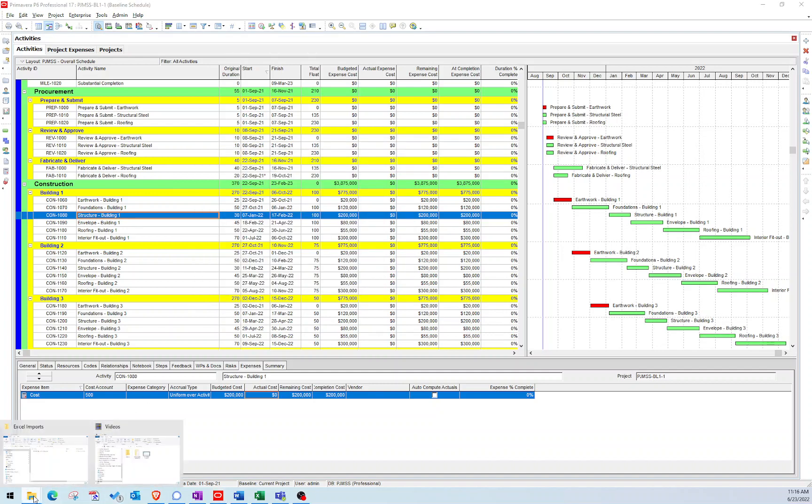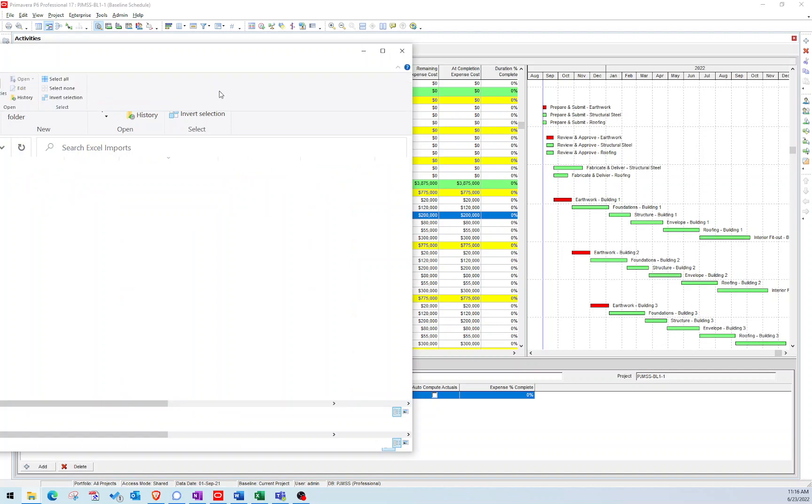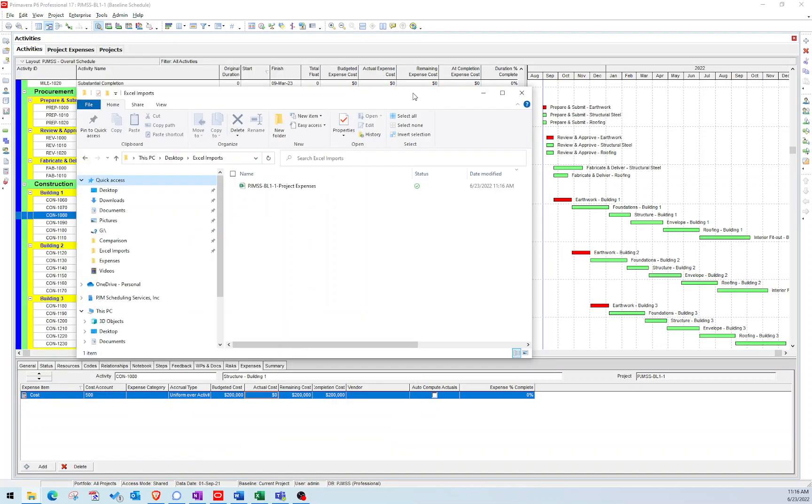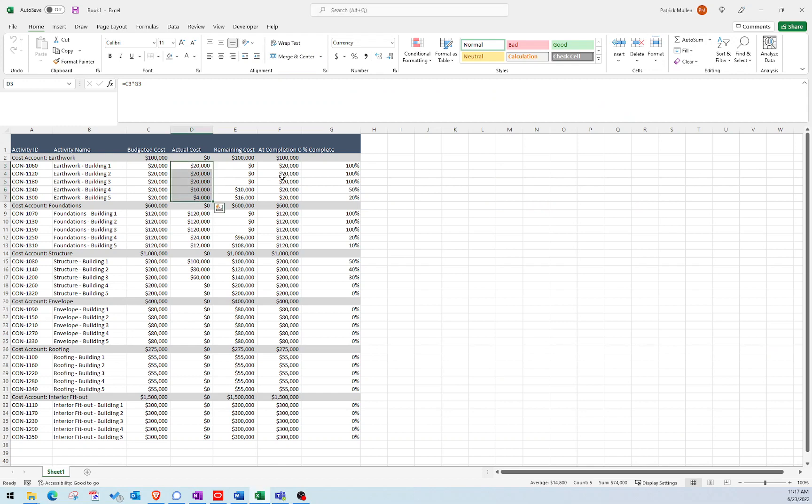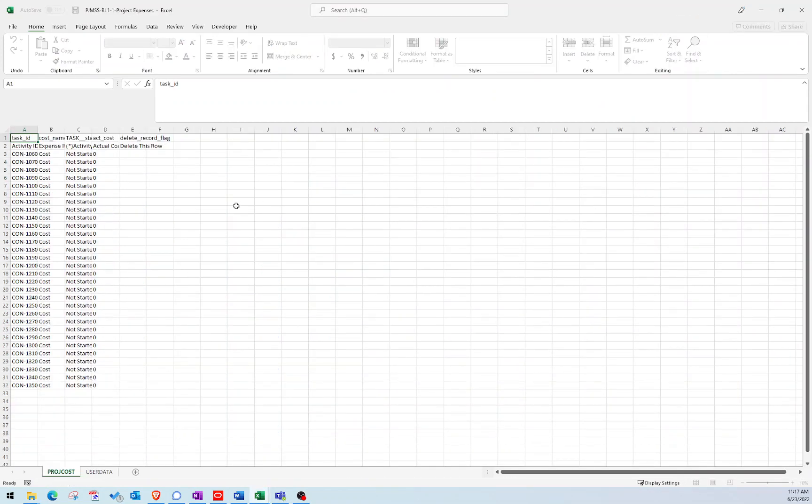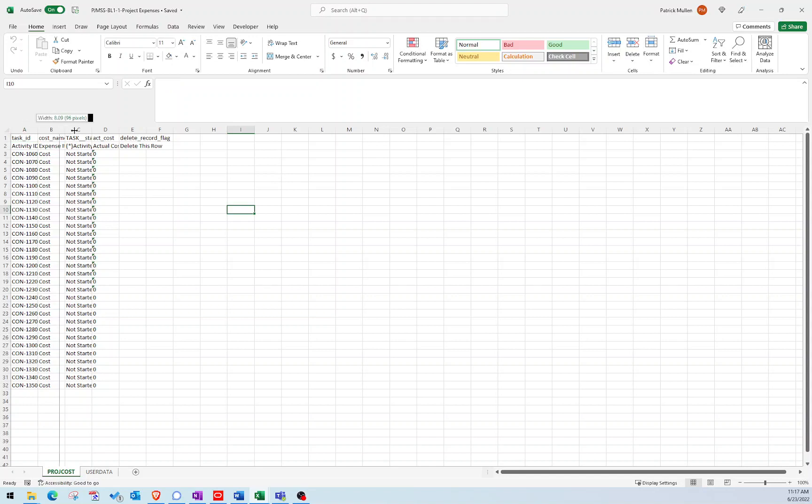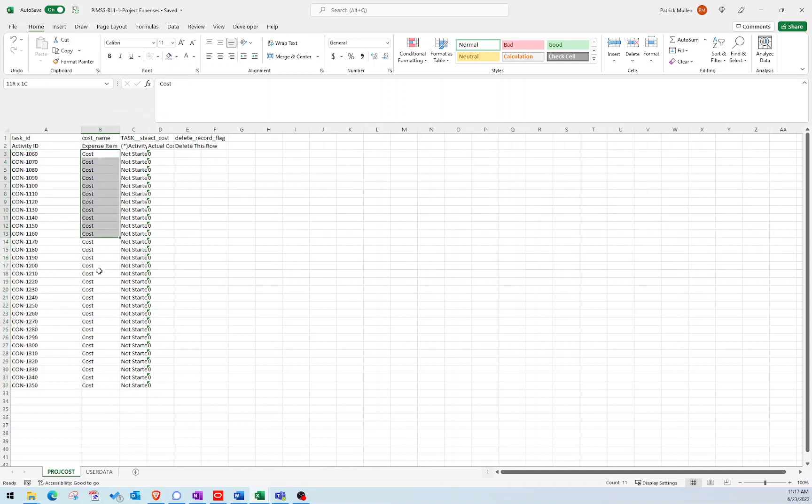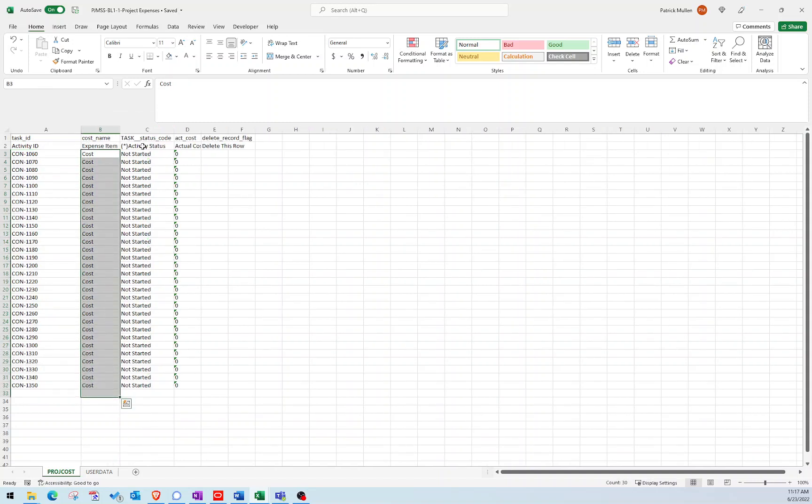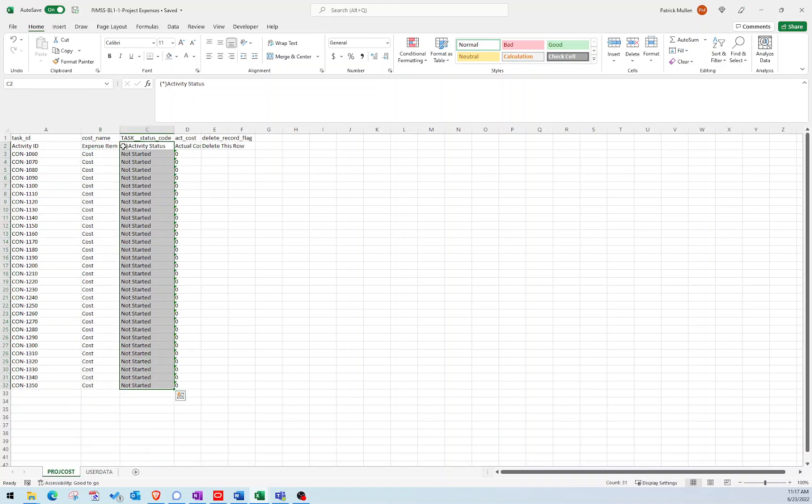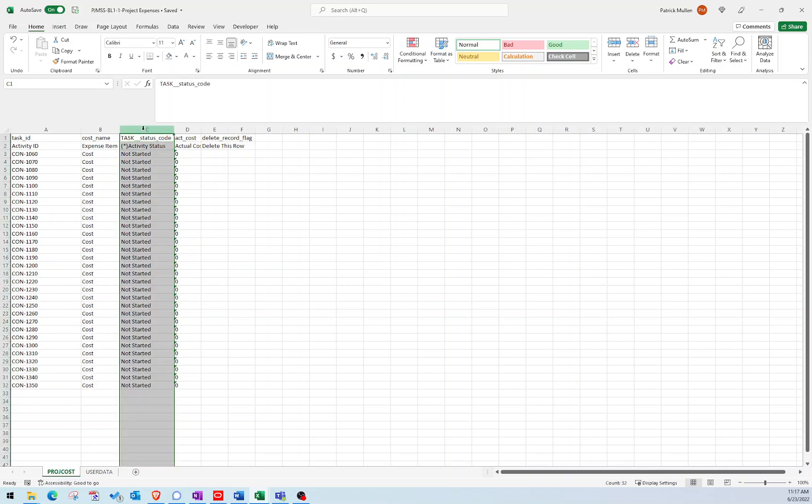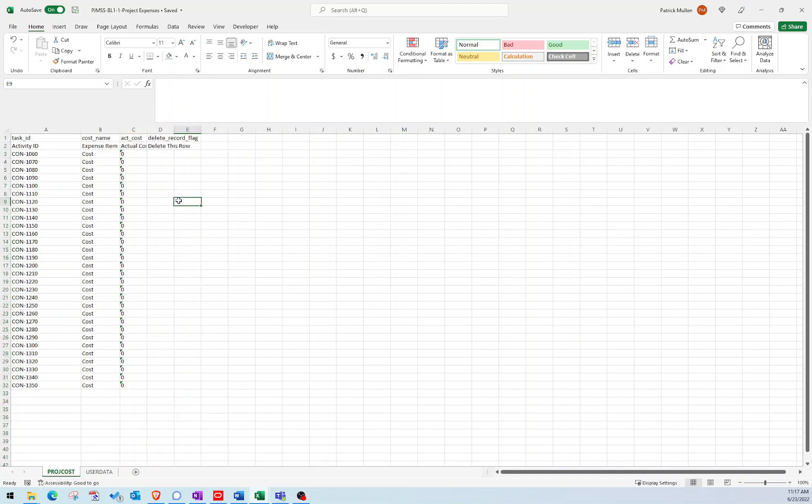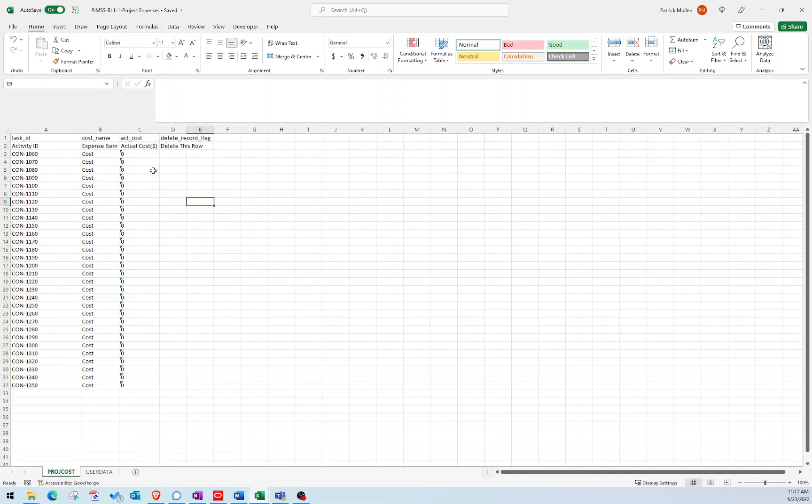Just go search for that file, which mine is over here. So I'm going to go ahead and open that file up. And here is what it looks like. You can see I have all of my activity IDs. The expense item is called cost. I mentioned before we don't need this activity status. And just as a for your information, anything with an asterisk in the column is not an importable field. So I actually can't import values from this column, so I'm going to delete it because I don't need it anyway. And then we have our actual costs.